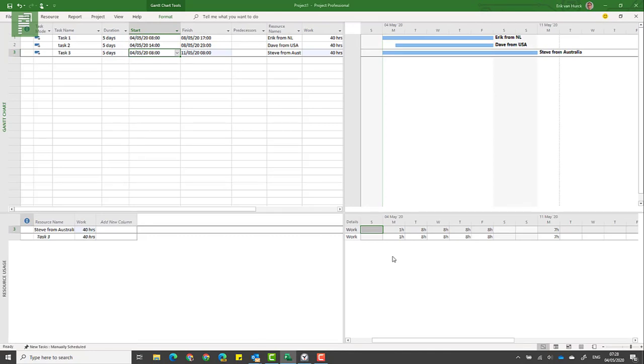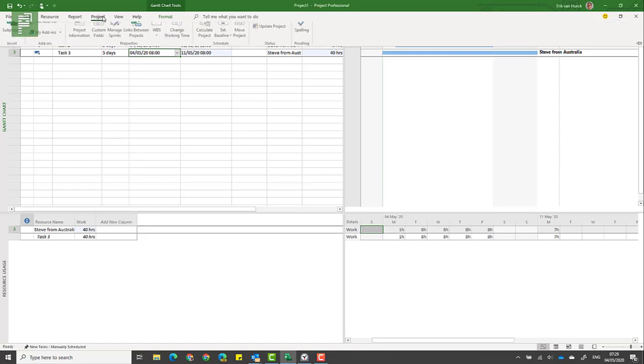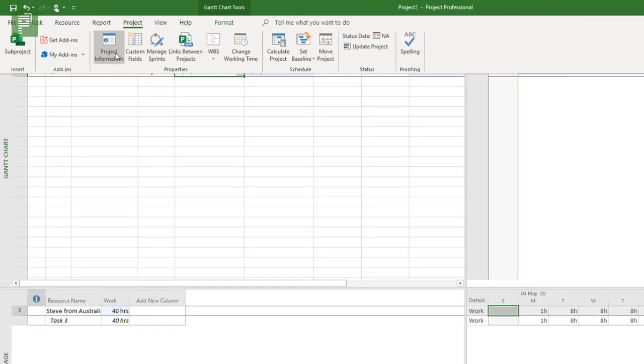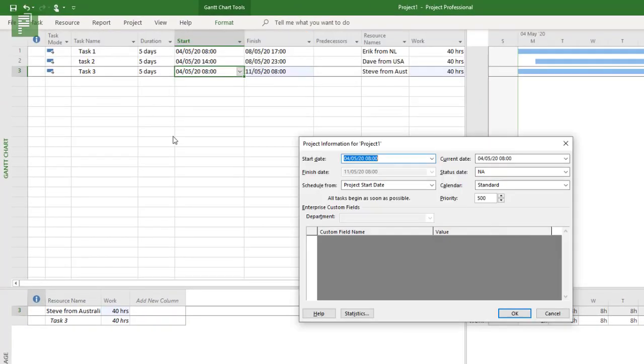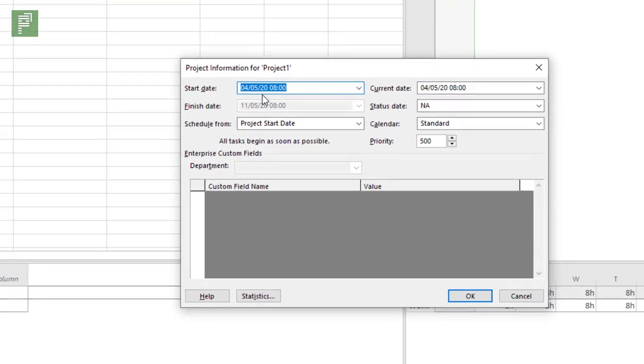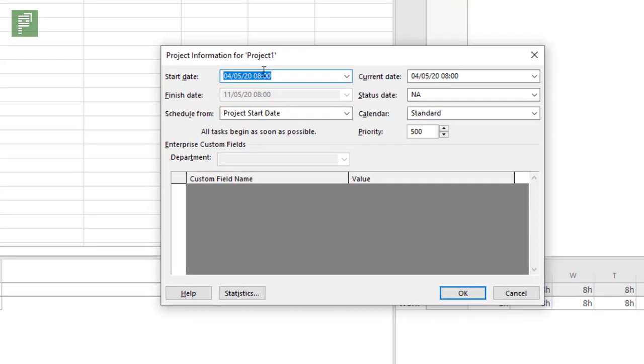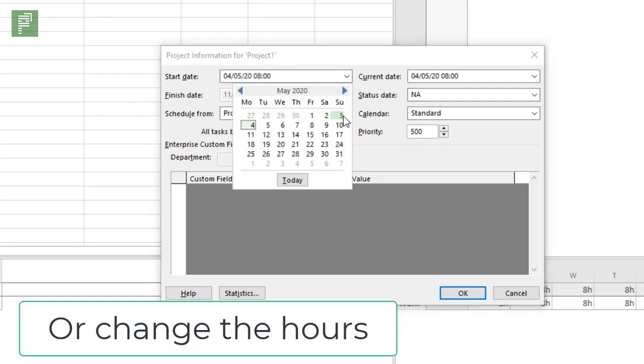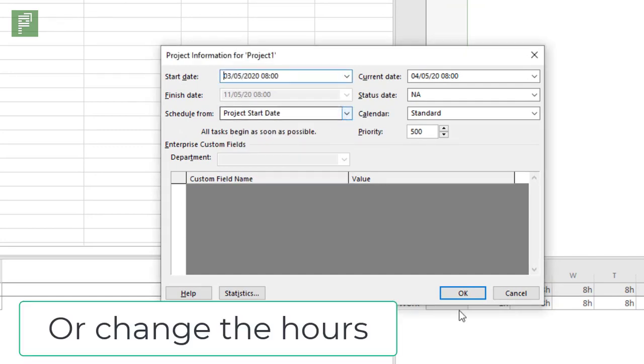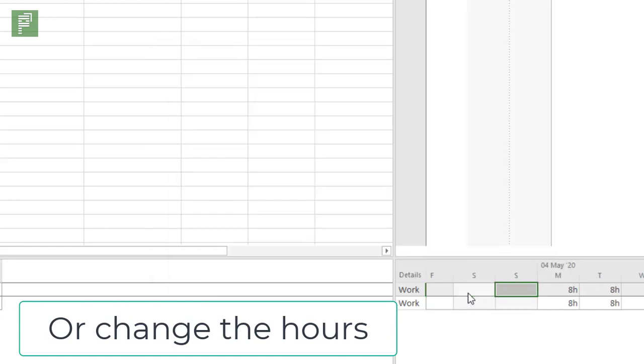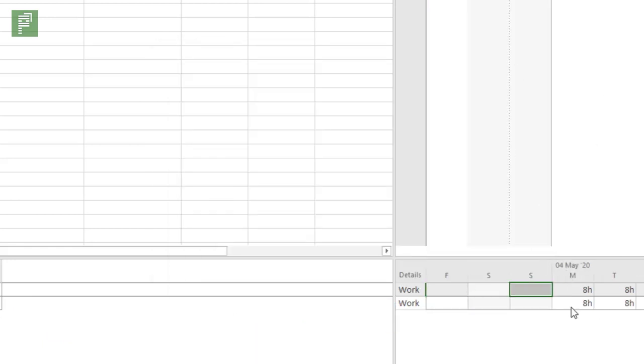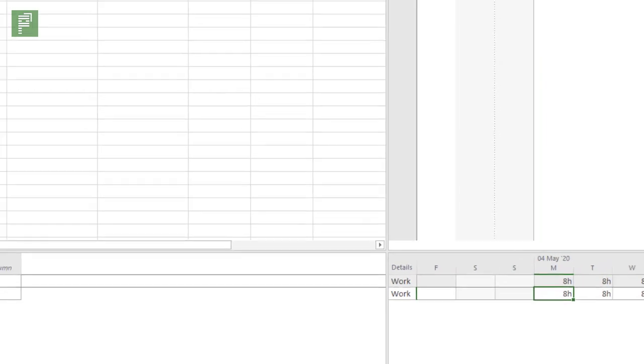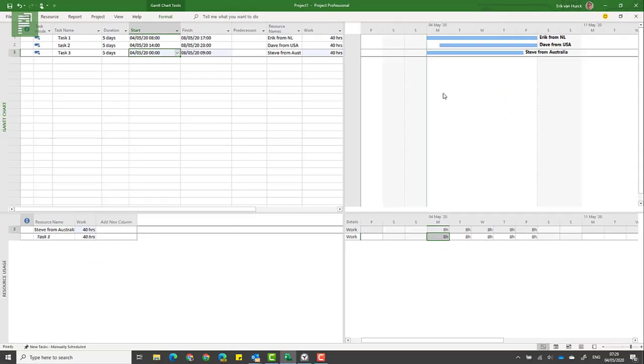Well, because the project actually starts on Monday, but it starts on Monday my time zone. So for Monday to be actually Monday that Steve can work, we need to have it starting at Sunday. And there we see that Sunday, all of a sudden, Steve works eight hours on Monday.